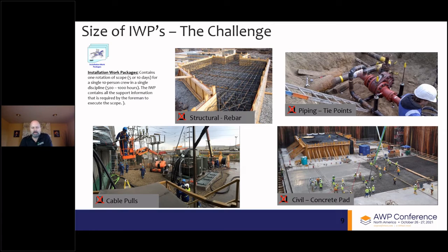However, what was meant to be a guide for the industry has become a rule, and far too often is dictated down to the contractors by the owners that thou shalt build 1,000-hour work packages. Over the past decade, each discipline has proven that as a rule, it simply doesn't work. Yet even today, both in presentations on job sites, this nightmare of 1,000-hour packages still plagues our industry. So whether we look at the concrete pours or piping tie points, and basically every discipline in between, a 1,000-hour work package is simply a very bad idea and creates far more problems than it's worth.